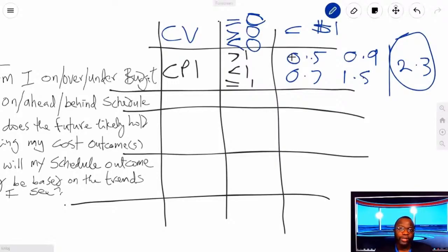So maybe you spent $29, but you got $30 worth of work accomplished. That's what that $1 means. On the flip side, if you have a minus $1, that would mean you have spent $30, but you only got $29 worth of work done. You see what I'm saying?